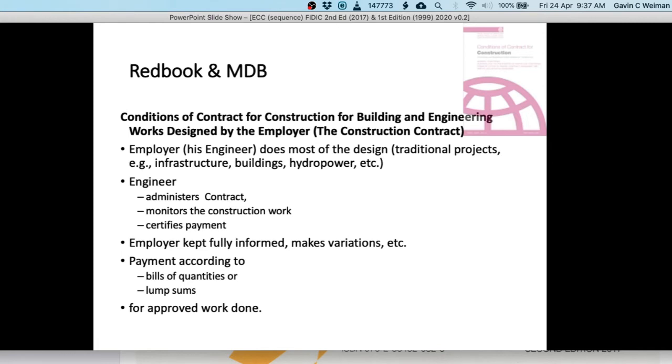The consultant obviously might, if there's good reasons for taking his client into account, but if his client disagrees and he thinks it is a correct thing to do, and the work with the safety of the project or the building might be compromised if this variation is not done, my understanding of FIDIC is that the client has to do what his consultant recommends, provided it is reasonable and rational, and the client cannot not consent, under common law ideas at least. Of course, the wording of the contract to the contrary.